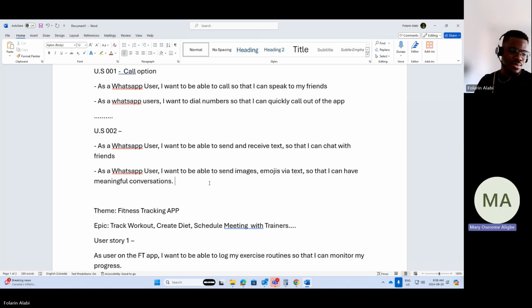It just got me thinking of how sometimes there's a limit to the amount of images, or if you're sending a document, the size of the document. So that could now be an acceptance criteria. Yes, they can create acceptance criteria for that. Given that the document is not more than 1 gig, when they click on it, they should be able to send it. I think I understand it now.